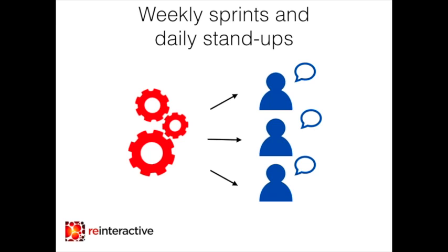And then as we go forward, we have our daily stand-ups, and in each stand-up, we're going to talk about what we achieved the day before and what we're planning on achieving in the coming day. And in that way, we are constantly in contact. We want to have a lot of contact with the stakeholders, and it's a really important thing to have that daily stand-up so the stakeholders can gauge how things are progressing, and it gives them an opportunity to keep their finger on the pulse, and also decide on those priorities.